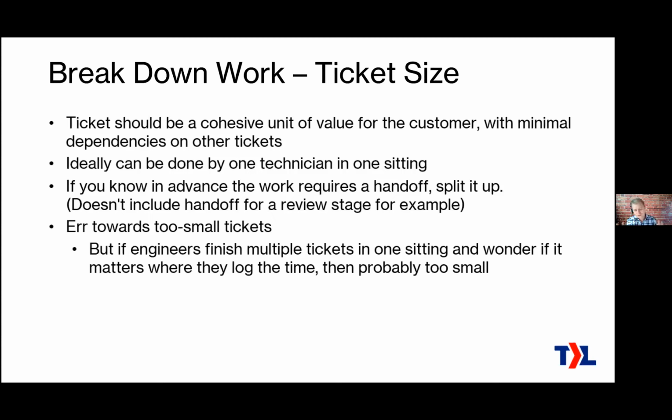If that happens, then you know that those tickets were pretty closely related, and the engineer might be wondering at the end of that time, okay, I got all these things done, does it really matter what ticket I enter my time on? If your engineer is wondering about that, then probably that would have been better as one ticket. Because inevitably they're very closely related, and they're all just always going to get done at once.